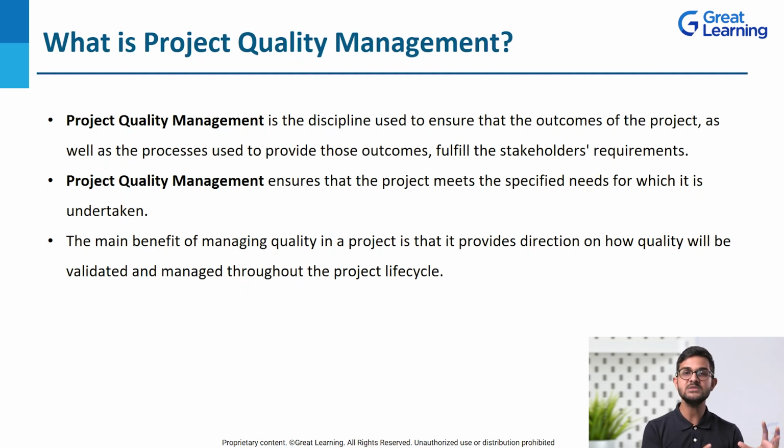And then according to that, we should have a proper quality plan ready. Once we have a proper quality plan ready, then we will go for quality assurance. And we will make sure that whatever plan we have, are we actually going to meet those needs? Are we actually going to meet those requirements? That is done by quality assurance throughout the project life cycle. And then eventually quality control. We see that, okay, this is a mismatch. This is what we are supposed to get and this is what we are getting. If that's a mismatch, we always have to fill that. We always have to plan for that. That is quality control. So these are three major things and we will be discussing these three things in detail as well. First of all, you plan for the quality, then you assure the quality, and then eventually you control the quality.